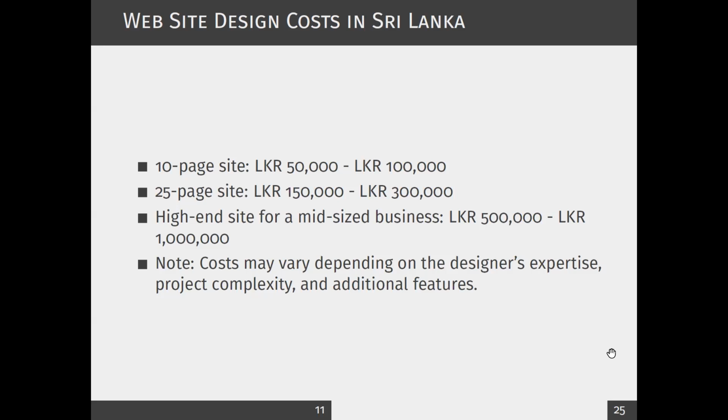Now, similar to the book, I have searched what the website design cost in Sri Lanka would be. By going through what is available on the internet, we can think 10-page sites usually vary in Sri Lanka from 50,000 to about 100,000. If it is a 25-page site, it might be around 150,000 to 300,000.